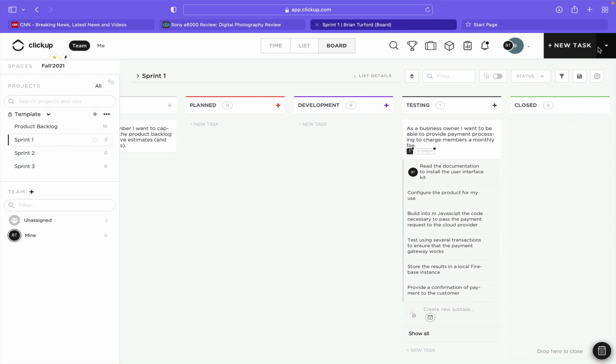So that's pretty much it. And the goal every time is to create a sprint plan that you can complete. The task should be completed in the sprint itself. You shouldn't have a situation, if you've done proper planning, where a user story will span more than one sprint. If it does, you need to break it down. So the goal at the end of every sprint is to have all the user stories and all the tasks completed. And that should be your goal as well.